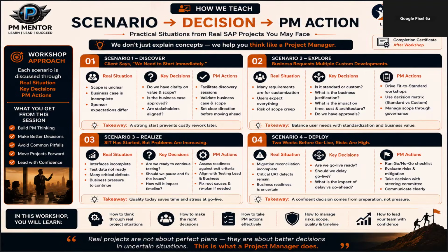You need to ask which interfaces are incomplete, which scenarios are blocked, is the test data issue minor or critical, how many high severity defects are open, are we actually testing the integrated solution, or are we only executing whatever test cases are available to improve the completion percentage?